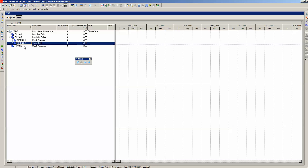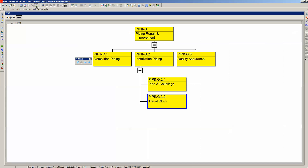Now that we've inserted our WBS, we can view it in P6 in a hierarchical chart view. In the top layout tool group, select the chart view icon and P6 will display your WBS in a chart view. This chart view can be printed out or you can capture a screenshot of it using Snagit to create a JPEG file, which can then be read into presentation software.